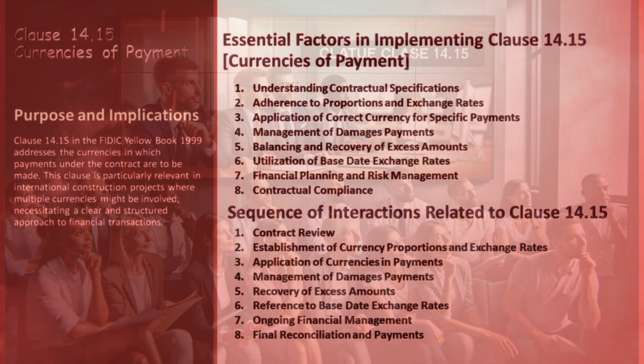Know precisely which currencies are designated for various types of payments. Adhere strictly to the proportions or amounts of local and foreign currencies and the fixed exchange rates stated in the contract, especially those specified in the appendix to tender. Apply the appropriate currency for payments and deductions under different subclauses like provisional sums and adjustments for changes in legislation.